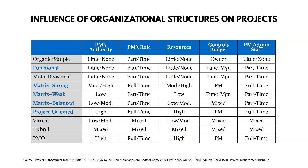Going down to the blue items at the bottom, in a project-oriented structure the project manager is going to have much more authority. Their role is oftentimes full-time, and they're going to have control of the budget and resources, and perhaps even a full-time project management administration staff.